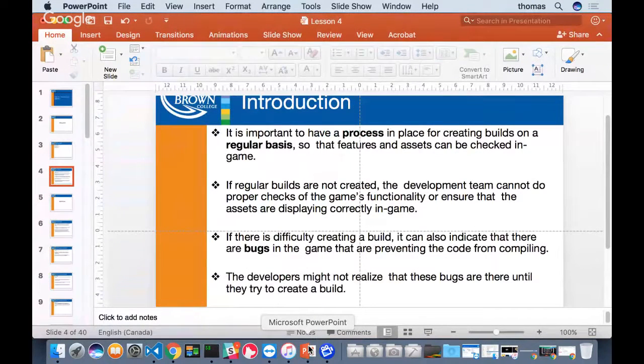So what we want to try and do is, when it comes to making a build, we have to think about that iteration, my sprint. You can call it a sprint or iteration that I'm working on. We don't have 2 to 4 weeks. You guys only have a week, approximately, for each iteration, if we micronize it into the time you have. In that week, you should do a build pretty much every single week now until the end. If you haven't done a build every single week until the end, you guys are behind, guaranteed, 100%, right?